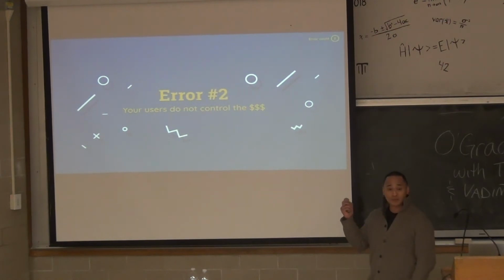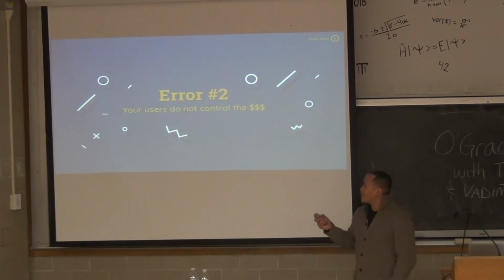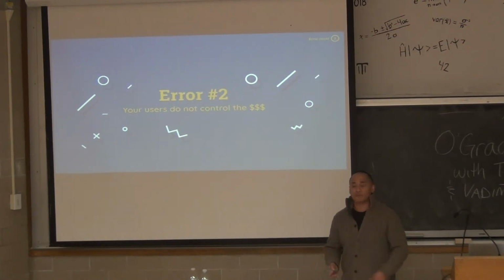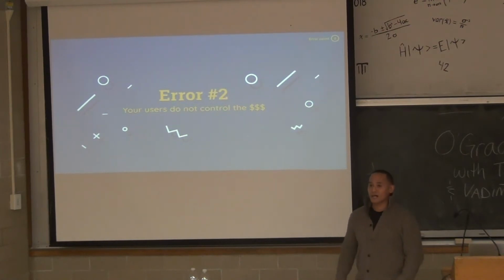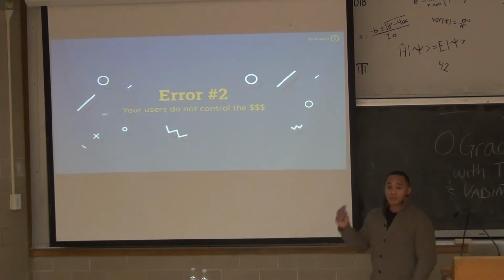Your users don't control the money. At the end of the day, you can do all the research you want, you can get all the buy-in you want, but if you don't know who you're selling it to, as consultants, you're not going to get the yes or the no that you want. So know who your product owner is right at the beginning of the stage, and make sure they're part of it every step of the way, or else you're not going to get buy-in.